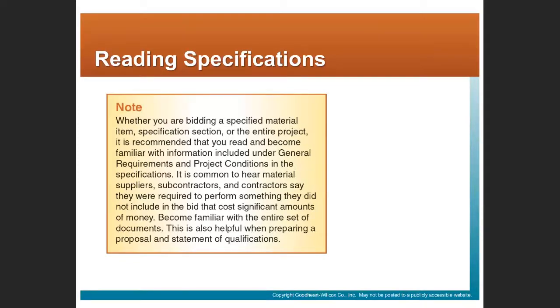If you're the contractor, you need to understand what's in those specifications because that describes what you are expected to do. And there's lots of little ways that contractors can get tripped up if they miss something in the specifications. Oh, geez, I didn't know I needed to do that, right? I didn't know that I needed to test my high voltage cabling and have the testing approved before I can put piece of equipment X online, right?